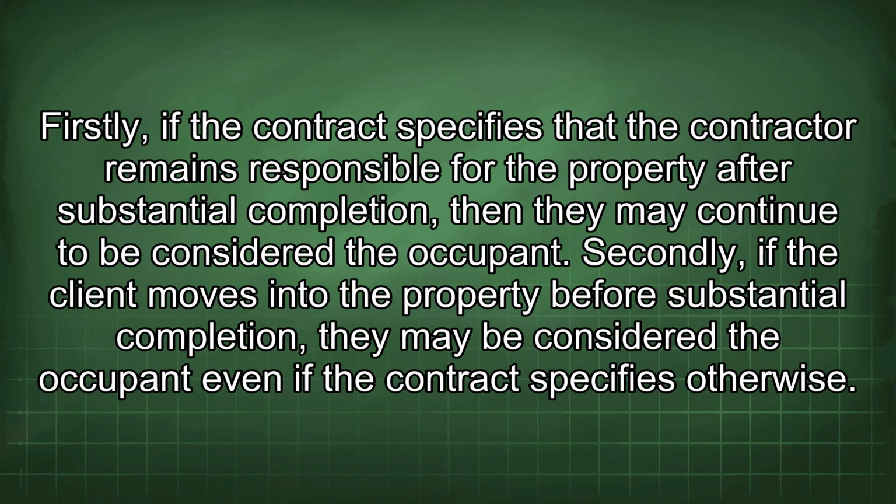Firstly, if the contract specifies that the contractor remains responsible for the property after substantial completion, then they may continue to be considered the occupant. Secondly, if the client moves into the property before substantial completion, they may be considered the occupant even if the contract specifies otherwise.